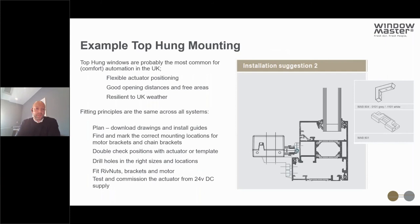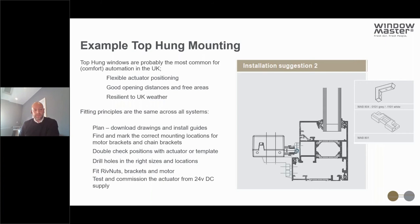If there's more than one actuator, it's really important they are synchronised on the window so they don't skew the sash — our actuator technology enables this simply through the cabling arrangement. A top-hung mounted window is probably the most common arrangement in the UK, offering good flexibility for actuator positioning, good opening distances and free areas, and resilience to UK weather. The fitting principles are the same across all systems: plan, download drawings and installation guides, find and mark correct mounting locations, double check positions, drill holes, fit rivnuts, brackets and motors, then test and commission. Actuators go through a short commissioning process of opening and closing to find their home position.